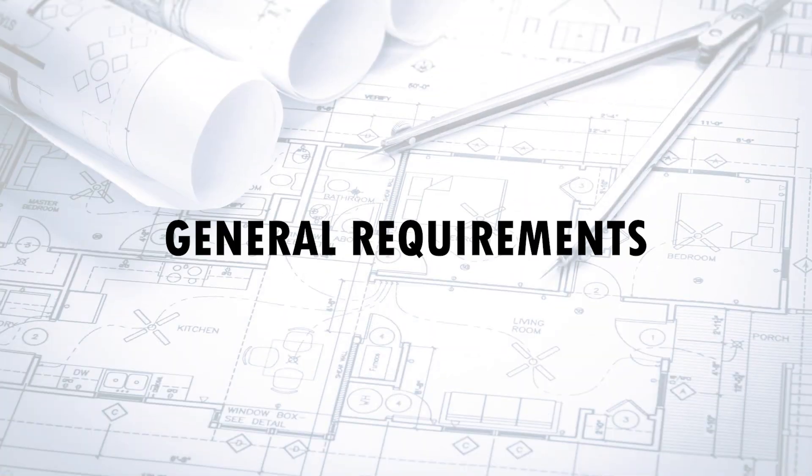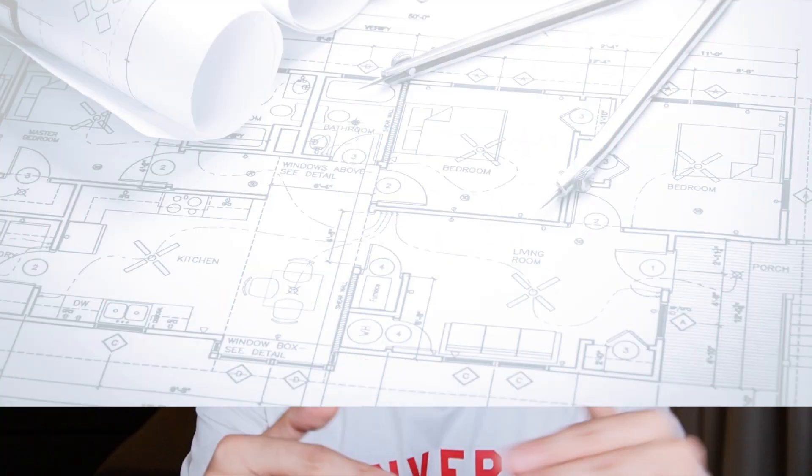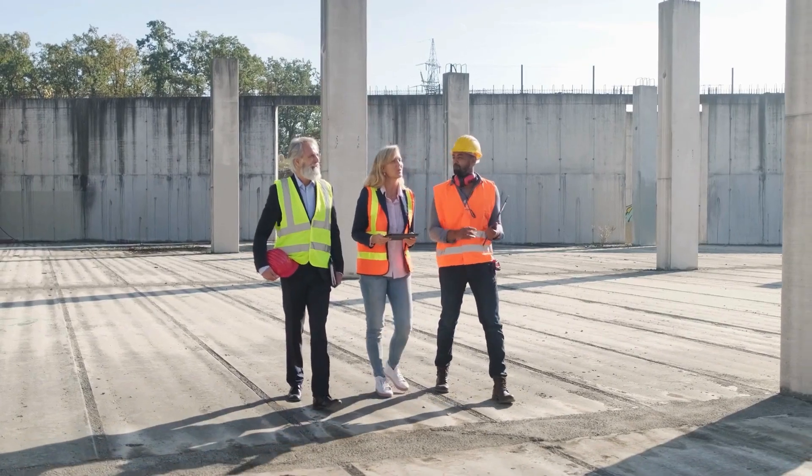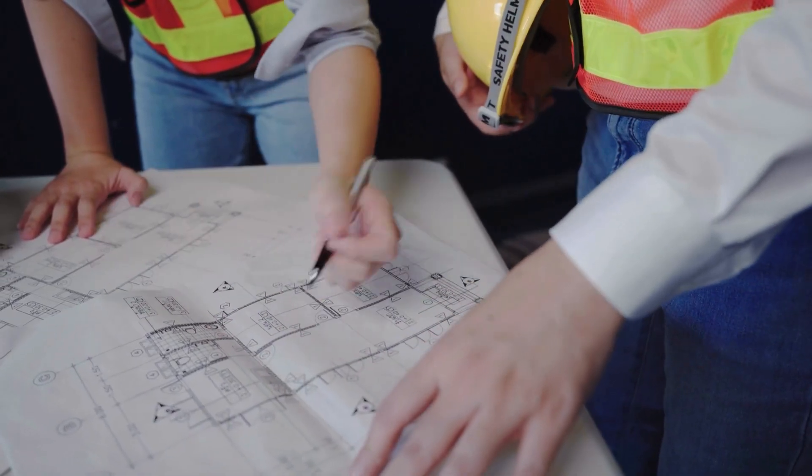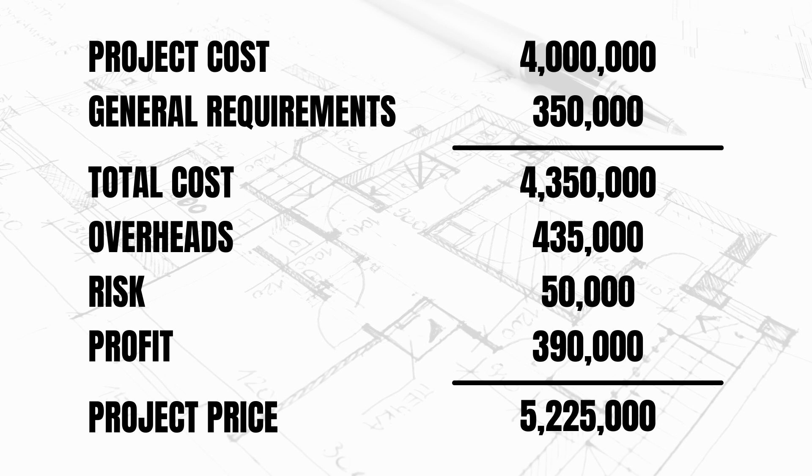When estimating the cost, don't forget the general requirements — these are general items that support the execution of your project, such as project supervision, site office, site fencing, sign board, access roads, water, and electricity. These are called general items and you should allow for them in your cost estimate as well. Once you have estimated everything — your defined scope, measured quantities, and general requirements — you now have the total cost of the project.